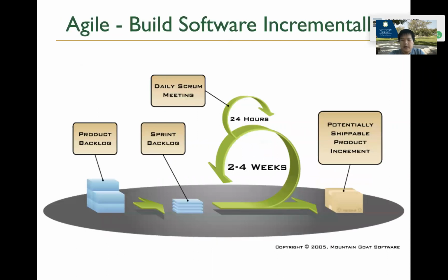All right. And then also some of the concepts I showed you: there is a backlog. This is where you put all the features, all the to-do list. And every sprint, in the beginning, you're going to have a sprint meeting to talk about what to put in the sprint. And once we decide that, we'll start a cycle to do the development.